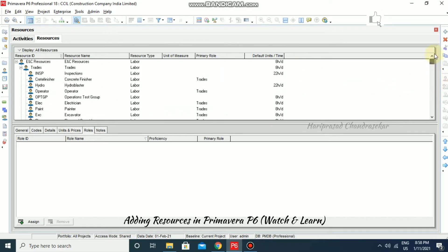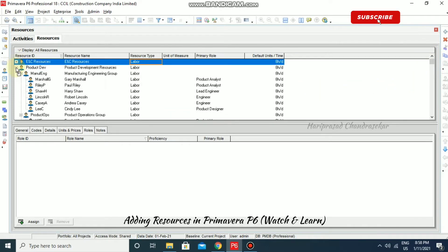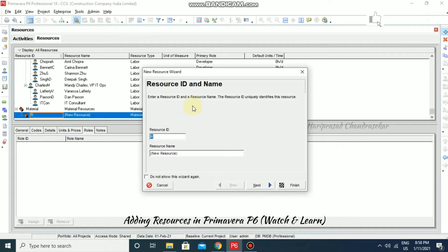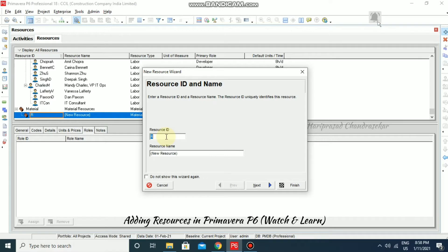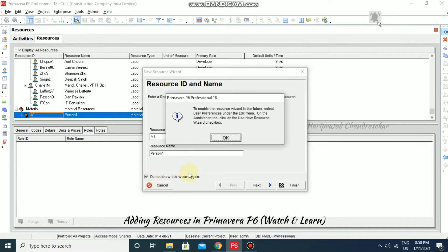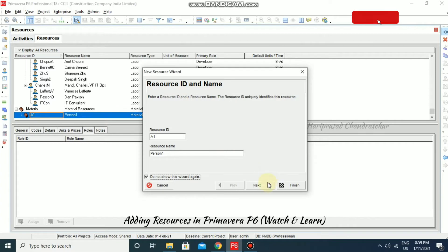If you want to add resources, there is a plus icon you can click to add a new resource. Immediately the new resource wizard will come up and you can put in a resource ID and then the resource name. If you don't want to show this wizard again, you can check 'don't show'. To enable the resource wizard in the future, select User Preference under Edit menu on the Assistance tab and click the 'Use new resource wizard' checkbox. I'm going to click Next.